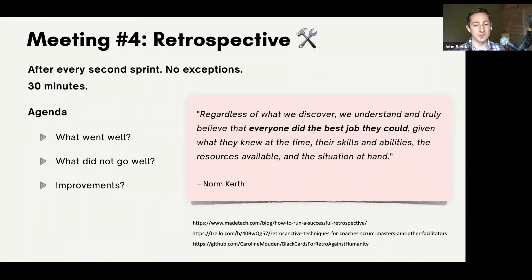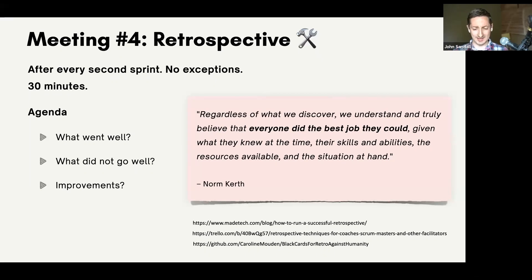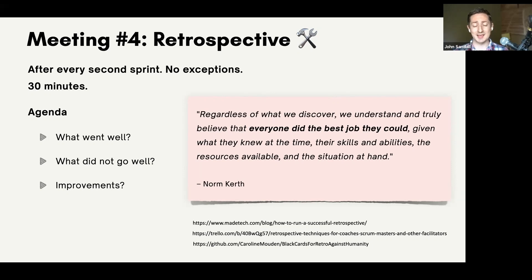Then we have the retrospective. I actually think this may be the most important meeting — and also the one most likely to be skipped. It's your opportunity to get together with your team and just reflect: what's gone well, what could have gone better, what do we change about our process? The reason it's so important is it doesn't really matter how you start agile or what flavor you choose — as long as you have a retrospective, you'll have the opportunity to evolve your process. Also, be very kind to each other. There's a nice thing called the Prime Directive by Norm Kerth: 'Regardless of what we discover, we understand and truly believe that everyone did the best job they could given what they knew at the time, their skills, abilities, resources available, and the situation at hand.'